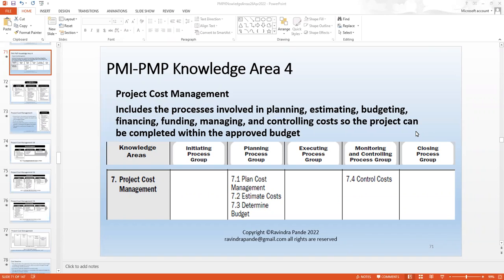So when I say these many tasks have to be done by these many resources within these many days, that gives rise to a cost. So how do we normally calculate cost? Man, material, machine allocated to project per given day, per given hour, depending upon your organizational quality processes, we calculate the cost. So how many days we are going to use the resources, and how are the resources in terms of their cost linked to your project, and so on and so forth. That's how we normally derive the cost.